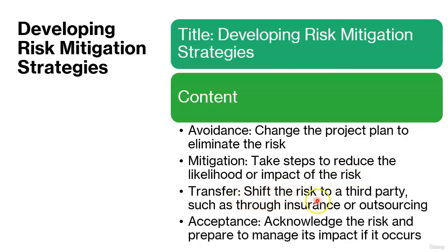Transfer. Shift the risk to a third party, such as through insurance or outsourcing. Acceptance. Acknowledge the risk and prepare to manage its impact if it occurs, often used when the cost of mitigation outweighs the potential impact.